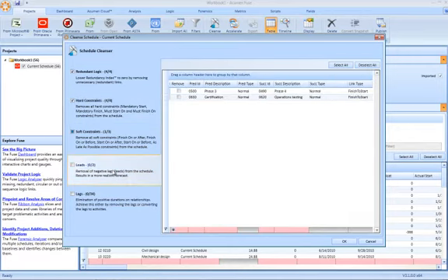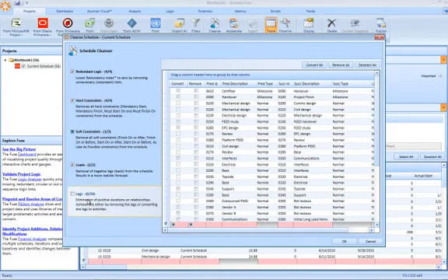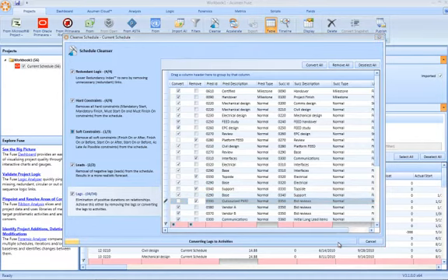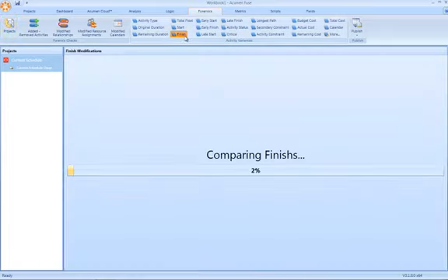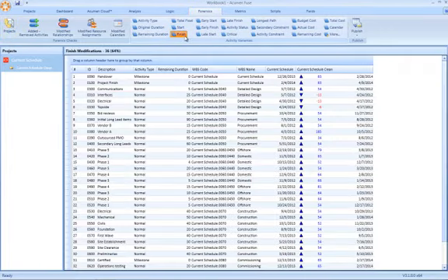You'll notice now the ability to remove negative lags or leads, and then within the lag section itself, the ability now to either convert every single lag to an activity or alternatively simply remove the duration from the relationship, in essence removing the lag. From this point forward, the generation of a cleansed scenario is exactly the same as it was in 3.0, and you could choose to go to the forensics module and interrogate the changes within the schedule, for example.